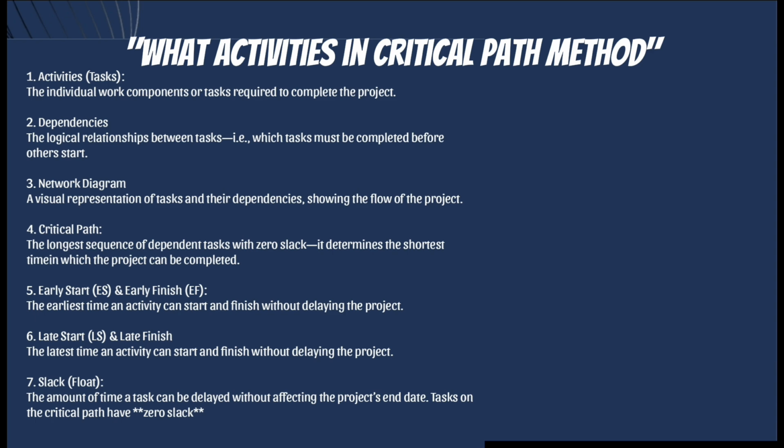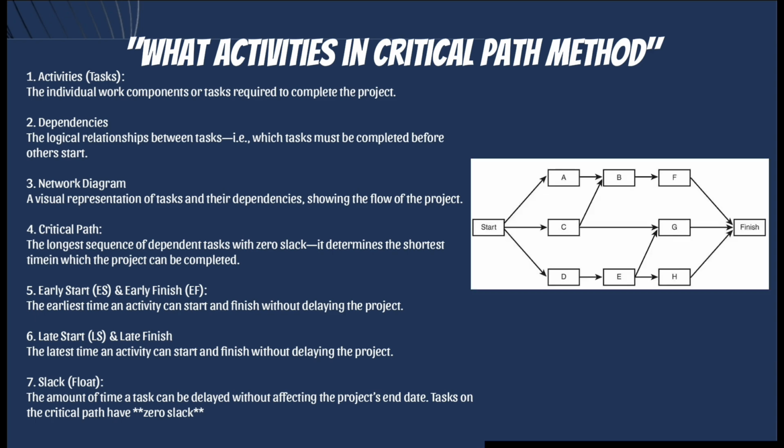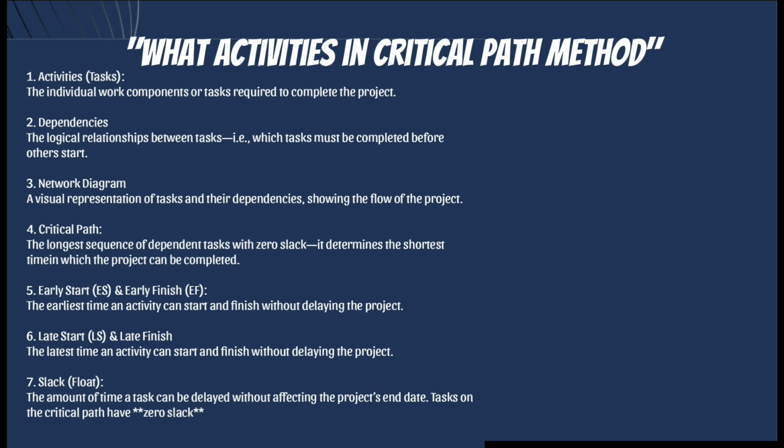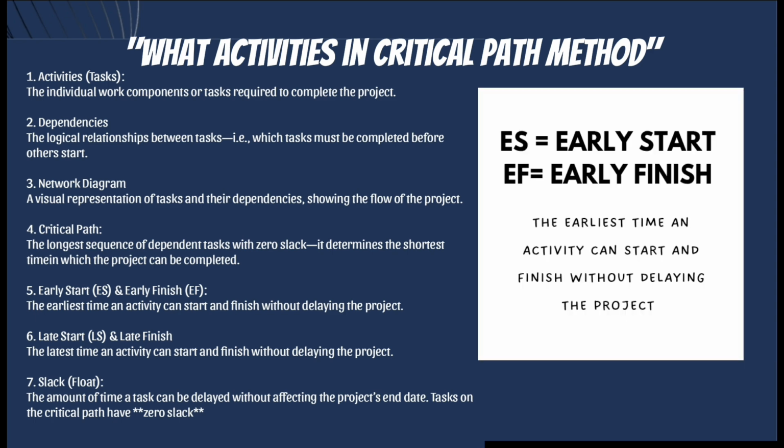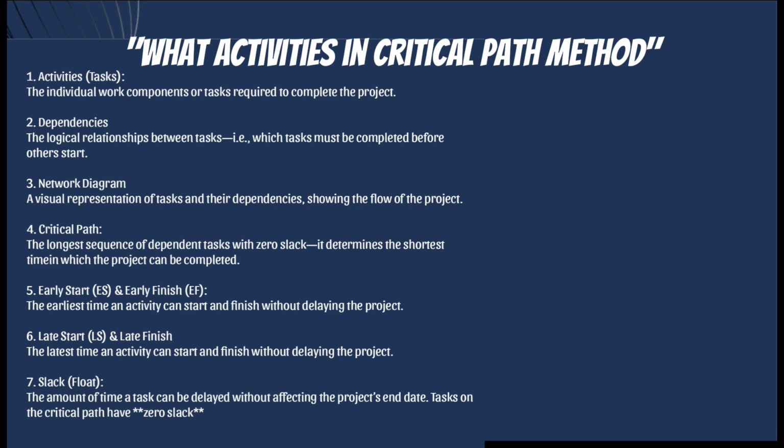Fourth, critical path method: the longest sequence of dependent tasks with zero slack. It determines the shortest time in which the project can be completed. Fifth, early start or ES and early finish or EF: the earliest time an activity can start and finish without delaying the project.